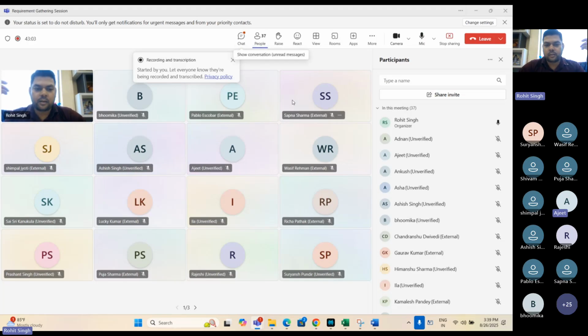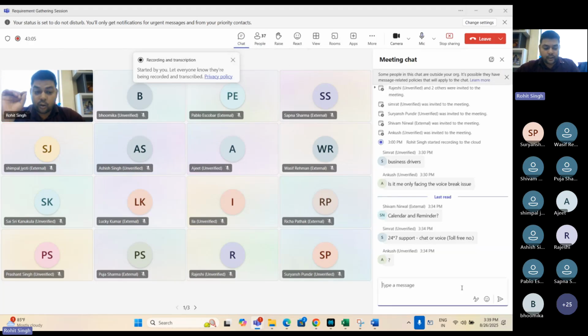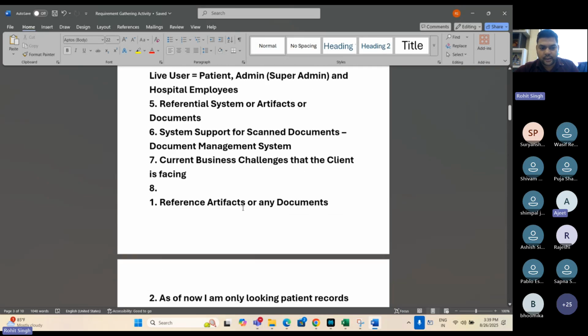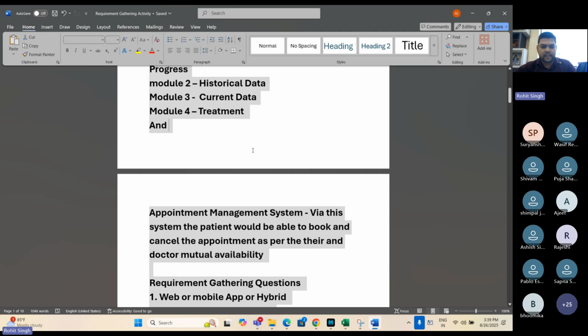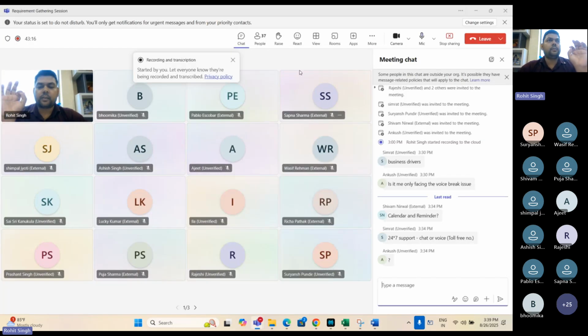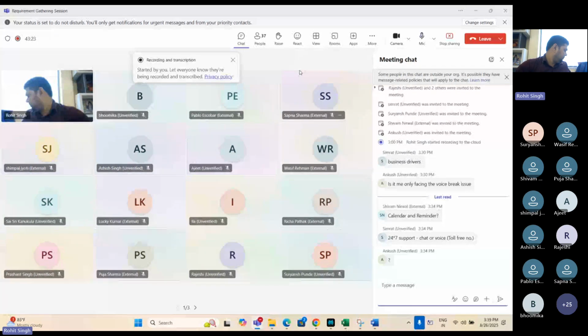the business requirement document. So according to all these requirements that I get vaguely from the client side, I will create a business requirement document, which will include further functional and non-functional and technical specifications. And accordingly, it will be given to the product owner, CTO and client. Once I get the approval, the client is onboarded.